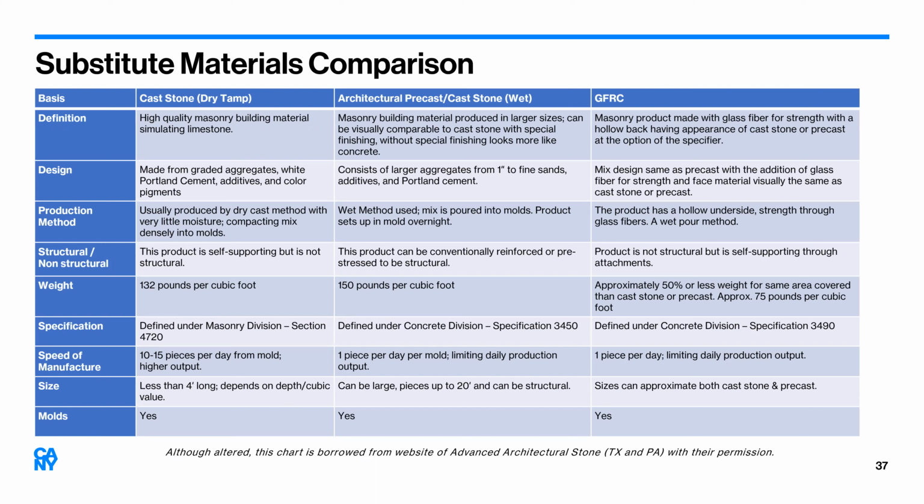Quick question: what's the reason for the long lead times? Is it just the color match? No, it's the whole process. The whole thing from beginning to end, every step of the way I showed, you're molding, you're drying, and each one of those can take weeks. And then there's the demand.